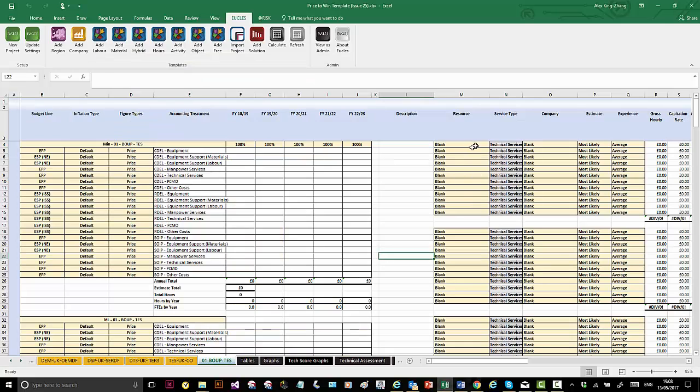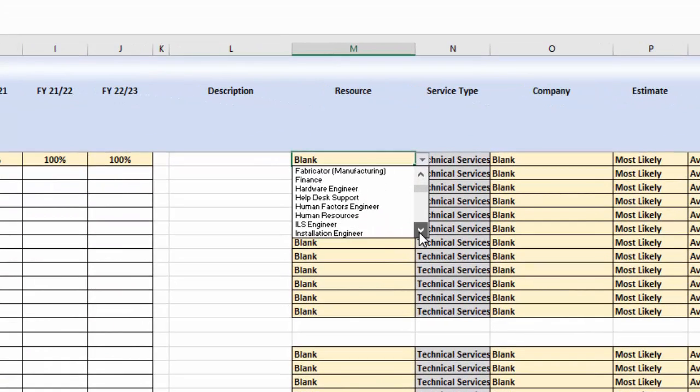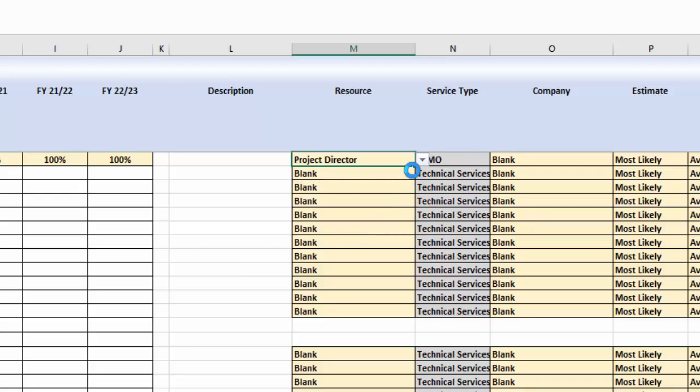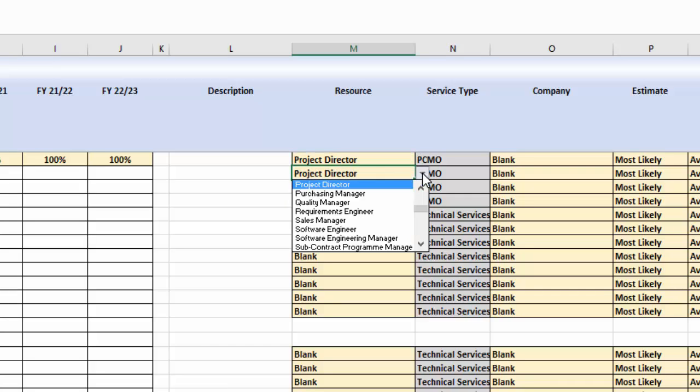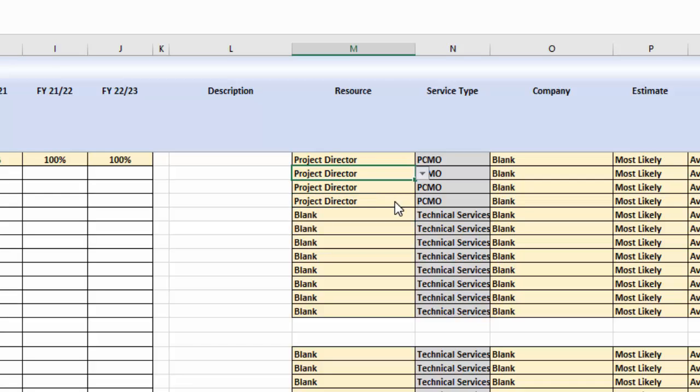Okay, so this is our estimate tab. I know it looks complicated to start, but you'll quickly get used to the interface and you'll see that it's really not that complicated. So I'm just going to do a bottom-up estimate right now. That means I'm putting in a bunch of resources. Now, Eucles comes with a bunch of data in it, a lot of economic data. It knows what different national average salaries are in different countries, about 26 different countries, but you can always add your own. It knows what regional differences are.